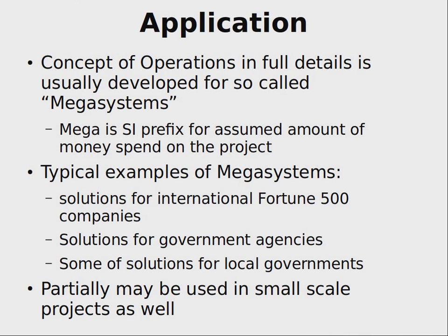And how do you apply it? In real life, concept of operations usually is created for large-scale projects, because for smaller projects this feasibility study or creation of concept of operations may be so trivial, so small, that you don't need to highlight this as separate stage of your project with separate tangible deliveries or outcome of this study, etc.